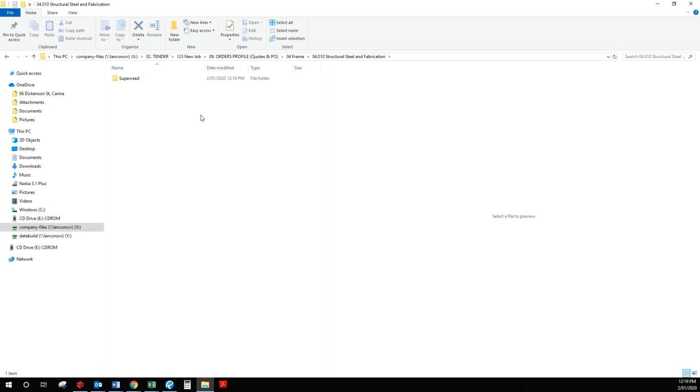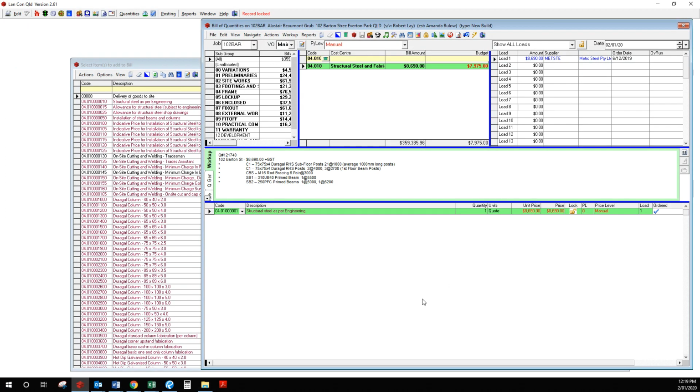It makes it much easier for the production estimator or the sales estimator doing the BAPCV, the building approval post-contract variation, which takes into account any additional costs that have been added into the job since it was first priced by the sales estimator. So sometimes you won't have engineering when you do up the sales estimate. So you might make an allowance. You might say, well, I'm going to need 2 posts and a beam across the garage door. That's all I'm going to note in here on the actual tender document. So you'll note that in the specification item there as well. That's all that's been included.